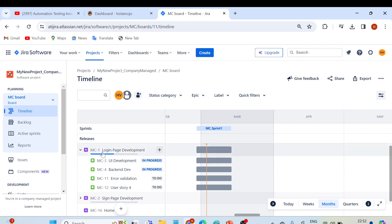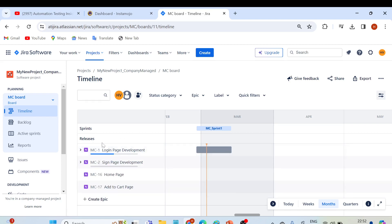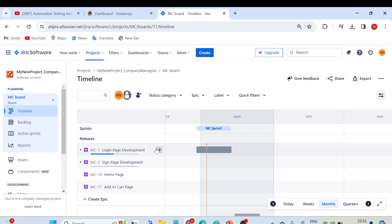Similarly, we have another epic 'MC hyphen 2 Sign Up Page Development' with a few user stories inside it. An epic is a large amount of work which is further divided into different smaller units in terms of user stories. You can see the blue color line which denotes the progress of this epic — two of four in progress. If I talk about the sprint, this is the sprint cycle created on the 28th of February, a two-week sprint ending on the 13th of March.